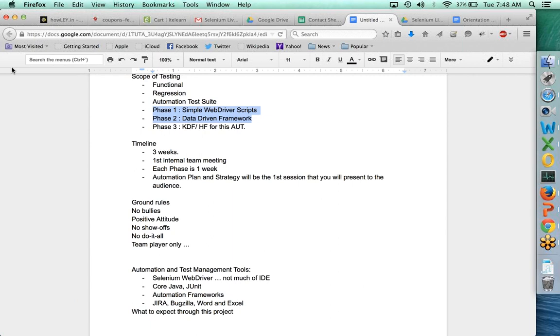There is a client who will hire a vendor, like a large, let's say, Indian IT organization. I don't want to take names, and I'm not even saying that it is done intentionally, but a lot of times, let's say they say 100 people in this project. The IT organization puts 100 people, let's say 20 onsite and 80 offshore. Out of these 80 people in the offshore, they give the names of everyone.